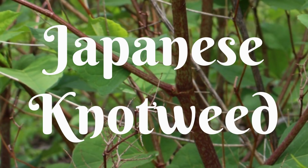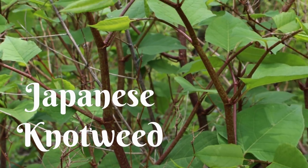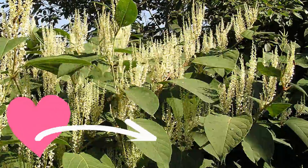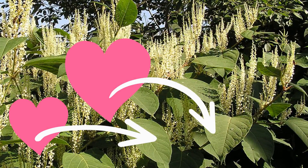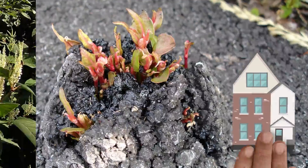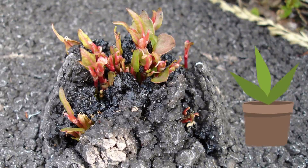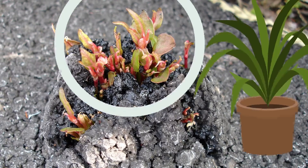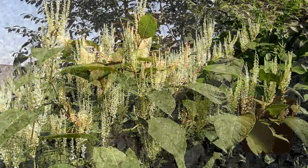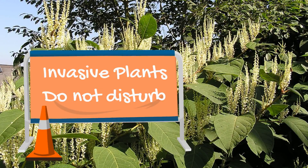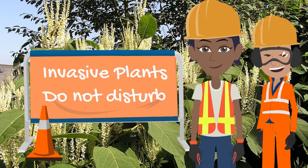Japanese knotweed is a fast-growing, clump-forming plant made up of many reddish-purple stems which mature to green with purple flecks. Its heart- or shovel-shaped leaves are spaced alternately on stems and it has creamy white flowers. It is highly invasive and its roots can cause significant structural damage to buildings. New plants can also sprout from very small pieces of root, making it very hard to get rid of. If you find Japanese knotweed on site, it should be cordoned off immediately and dealt with by trained experts to prevent further spread.